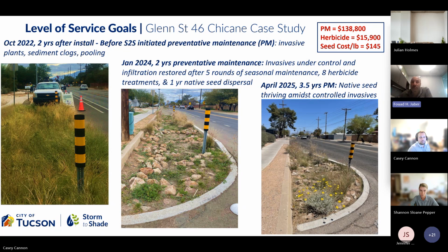And what we found was that if we do go with green infrastructure wherever it's possible, we can have very close reductions in flooding compared to replacing the old stormwater network with big pipes. And by putting in these systems, it was one fifth of the cost.